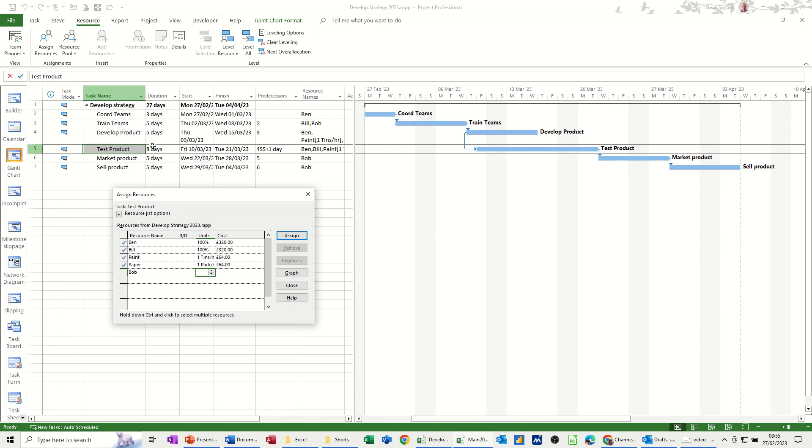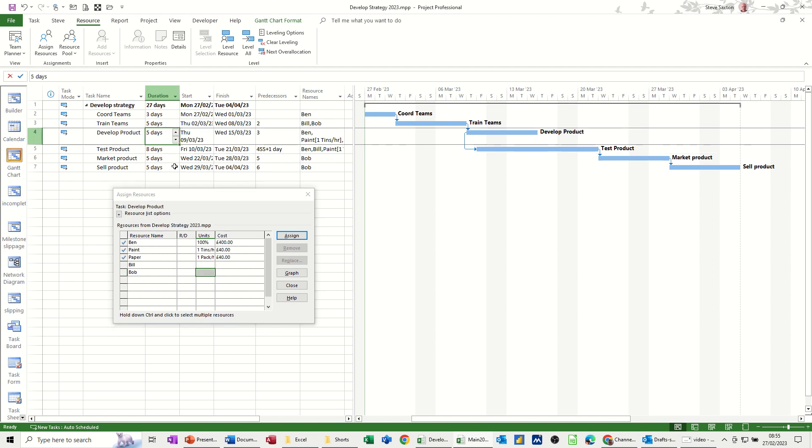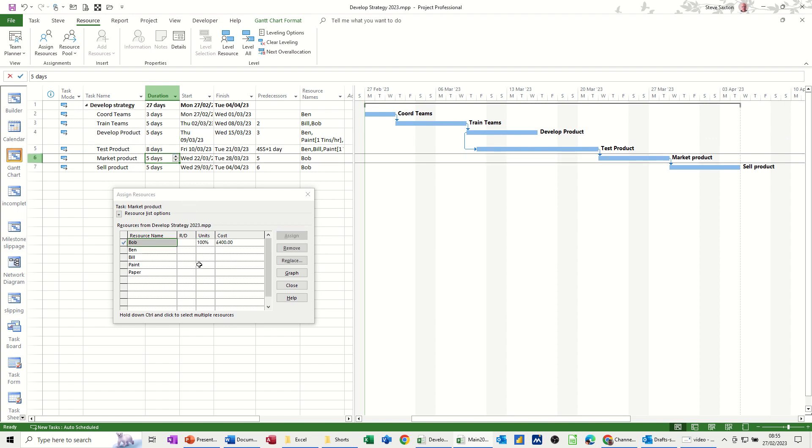So it's basically £8 per day. Because there's eight hours in the day. I've not changed the default settings. And then times the duration. So in this case, eight days. That one's five days. That one's five days. So I click onto that. That's what it's doing. 5.8 is 40. So it's working it correctly.